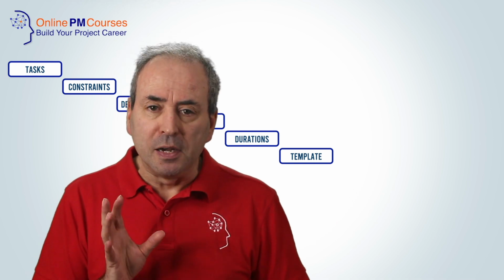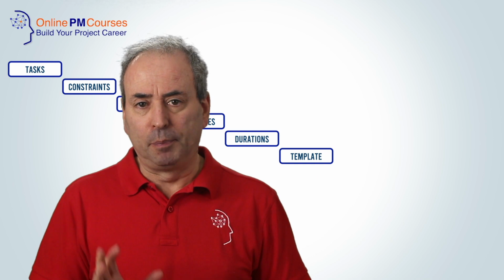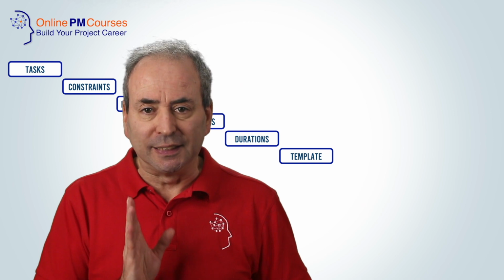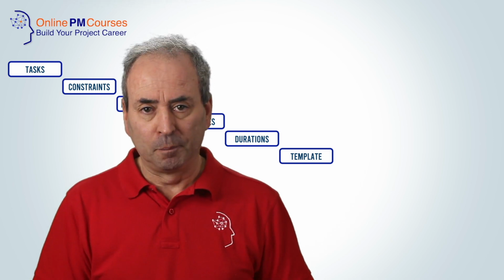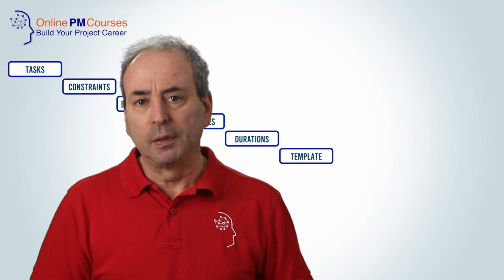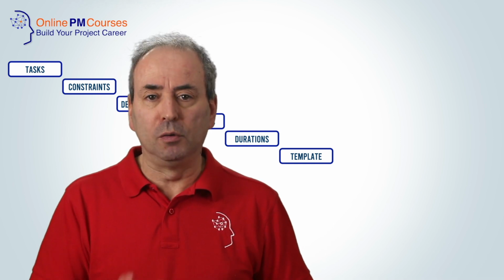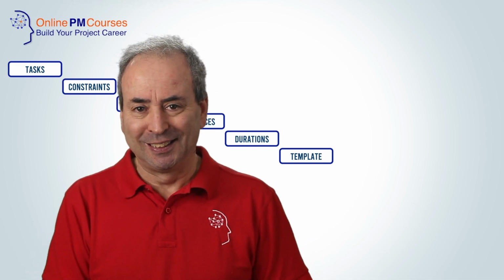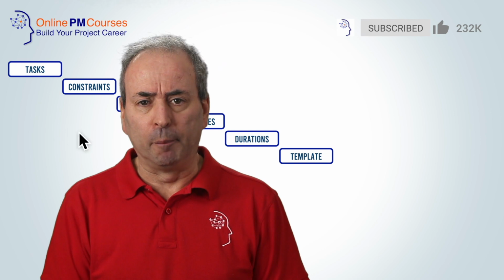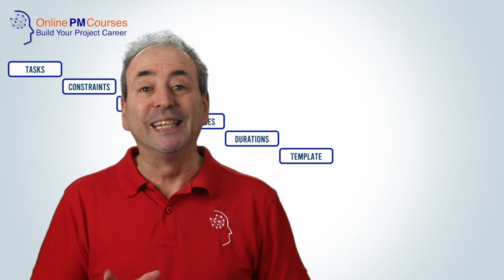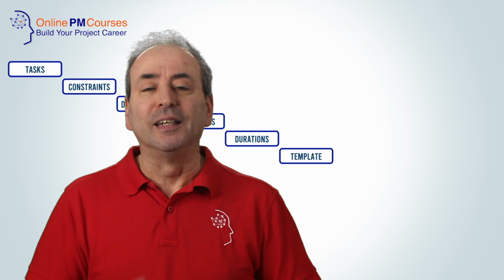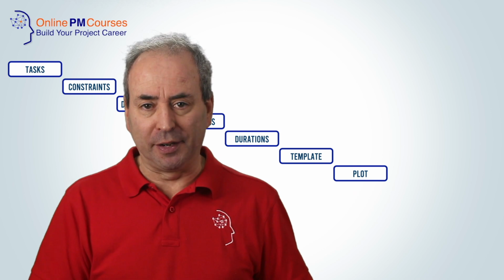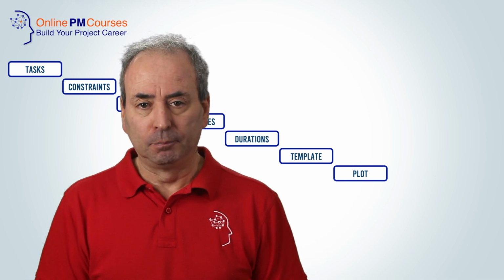Now, I'm not saying you can never work on a weekend, but you need to only plan to do this knowing that it's a decision that you've made and the right thing to do. Remember, if you allocate work into non-productive time, that gives you absolutely zero contingency. So think very carefully before you do it. Step 7 is simple. You've got all the data. Now you need to add your activities onto your Gantt chart grid to create your Gantt chart.